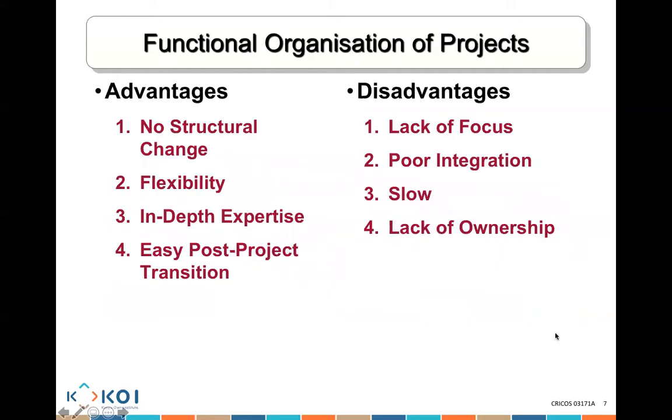Now, the advantages of this are that people are still working as part of the normal structure that they are already used to working in. It is flexible. If you need another department to get involved, you can get them involved. It provides expertise because people in each department who need to deliver that work already have that expertise. And it has an easy post-project transition. When the project finishes, nobody needs to move. These people were working in that team, and they're still working in that team.